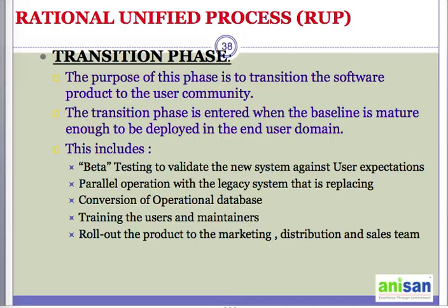So that's basically how we ensure that the solution is matured enough. This typically will require that some usable subset of the system has been completed to an acceptable level of quality, and the user documentation is available, so that the transition to the user will provide a positive result to all the parties. User documentation is very important because that will help the users to refer while using this solution at the initial stage. That's your help document.